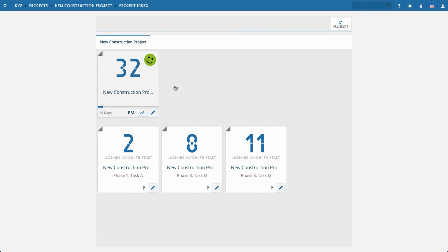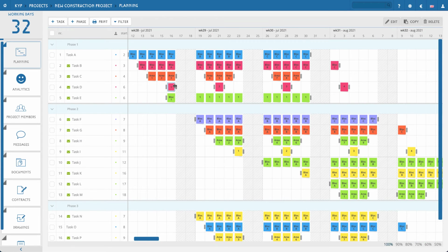If I enter back again as project manager, you will get a site that is familiar, and you will see a schedule that we just activated and now will be sent to everybody. One of the cool things in the tool is that every task has a green envelope in front of it, and that means that the invitation for that task is still pending. So the person hasn't accepted the task yet, which means that he or she has never looked in the planning before. As you can see, my own tasks with the blue post-its have the green envelopes removed because I just accepted all 3 of the invitations.